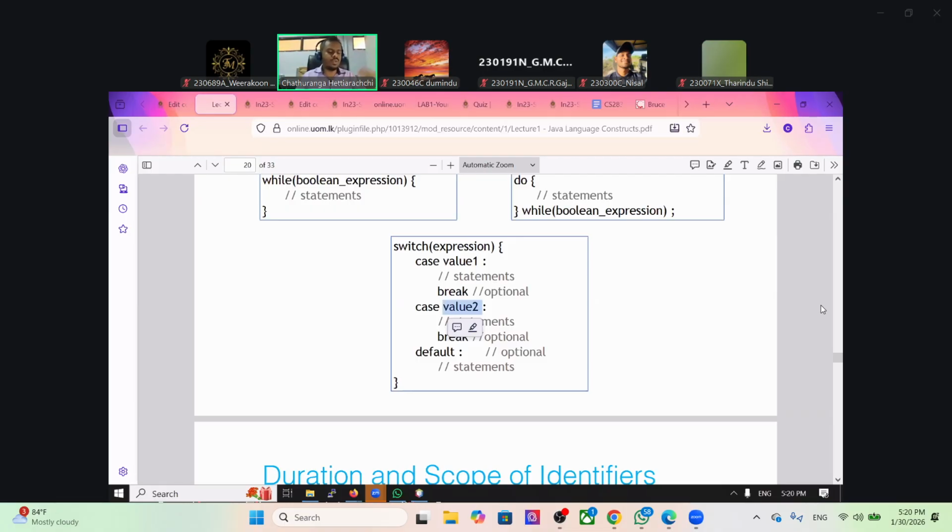So within 2 weeks, how can you get the majority of the code developed? The key is modularization. Then you put them back together, integrate, then you test whether its functionalities have been met. Then you can probably deploy it. That's the hope. So that process is the one which you need to get yourself familiarized with. So look into those things as well.